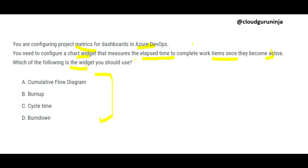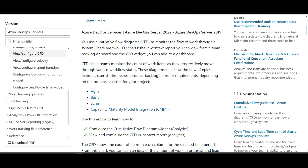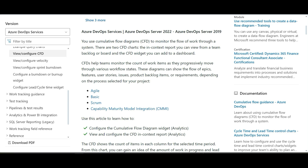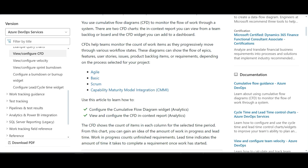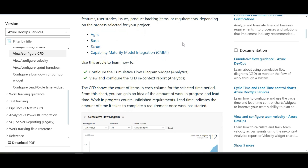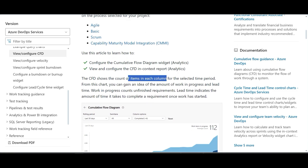If a task took five minutes, you want to understand that elapsed time. The Cumulative Flow Diagram (CFD) is used to monitor the flow of work through a system. There are two CFD options: the in-context report viewable from the team backlog, and the CFD widget you can add to the dashboard. It shows the count of items in each column for a selected time period.